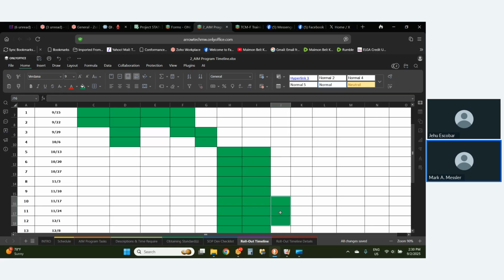The other thing is once you've audited the system, you're going to know where all the problems are, and we're going to write non-conformances on them, and we're going to fix them. So it's going to take you some time, and once you've done the first one, the second one gets a little faster, the next one gets a little faster. If it was me coming in, I could blast through that audit in 2 days, no problem. I've done it many times. If you haven't ever done it before, it takes some time. So that's why I say figure 3 weeks at the outside.